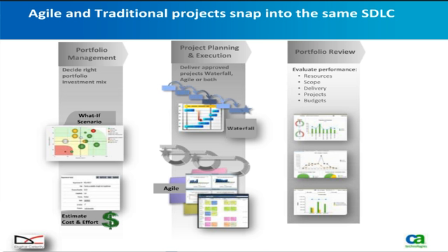If you're an Agile project, you don't open the project up in Microsoft Project, you open it up in Agile Vision. So you're doing the same basic thing. You're checking it out in Agile Vision, and everyone does all their planning in Agile Vision. The team member does their sprint planning in Agile Vision. They do their virtual walls and task planning in Agile Vision. They set their estimates and record their time in Agile Vision. And all of that flows back into Clarity.